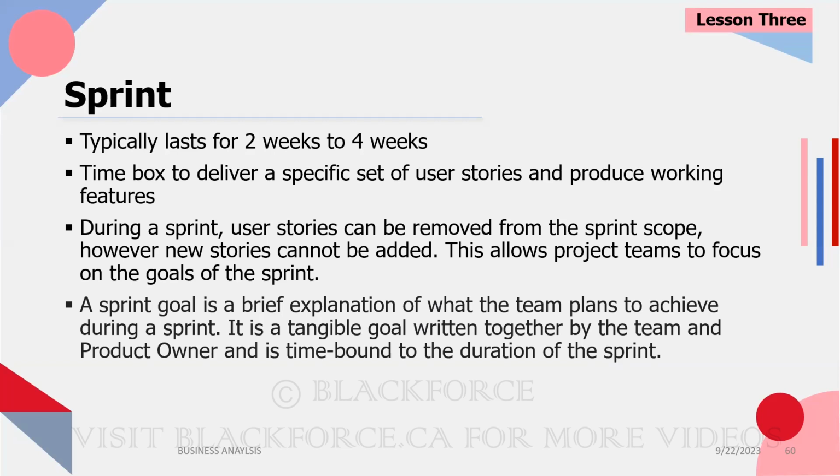So remember, we have the product backlog and we have the sprint backlog. So let's say we're planning for sprint 2, which will begin October 1 to October 15. Around the last week of September, we're going to have our sprint planning meeting. And I think that is my next slide. In case you're wondering, at what point do we have that conversation about what we're going to do in the sprint? You need to have that conversation before the sprint happens. So you're going to plan for the sprint. However, here we're talking about the sprint itself.